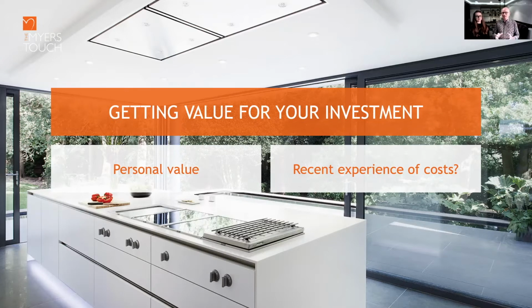In some senses we've seen prices be moderate, in the sense that there may be between 5 to 10% gain on a project. But if you roll that out, if we're on site with a client who has a £1.4 million build, and you say 10% on that, it's another £150,000 nearly. So there are some significant things to realise about the costs that are involved, and really budgeting for them.